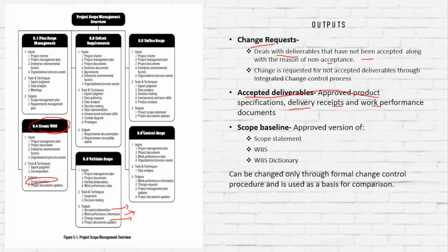What the WBS does is break down a bigger task into smaller tasks. Once we have created the WBS, we are clearer about what the scope is, and that is the scope baseline. Customers or the stakeholders, whatever you call them, will look into the scope statement and approve it. This baseline will help us gauge our performance. This is a baseline that we will reference.